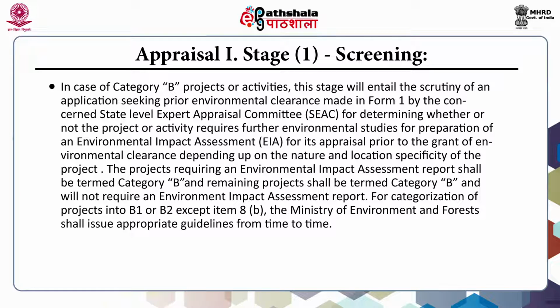The projects requiring an EIA report shall be termed category B1, and the remaining projects shall be termed category B2 and will not require an EIA report.